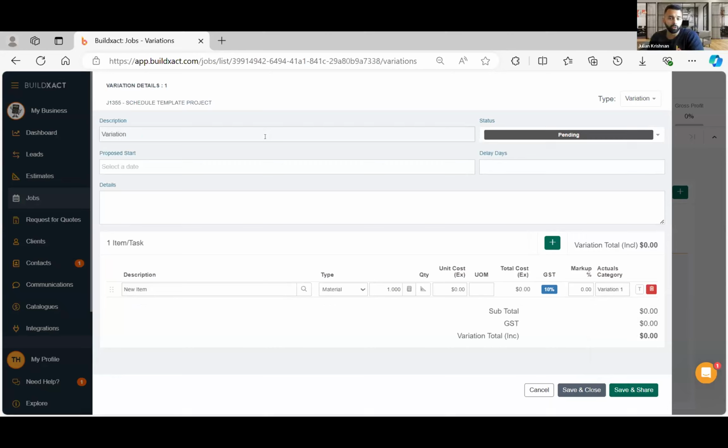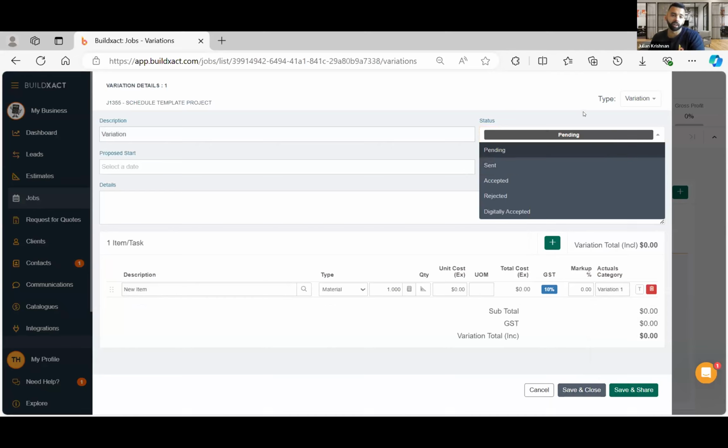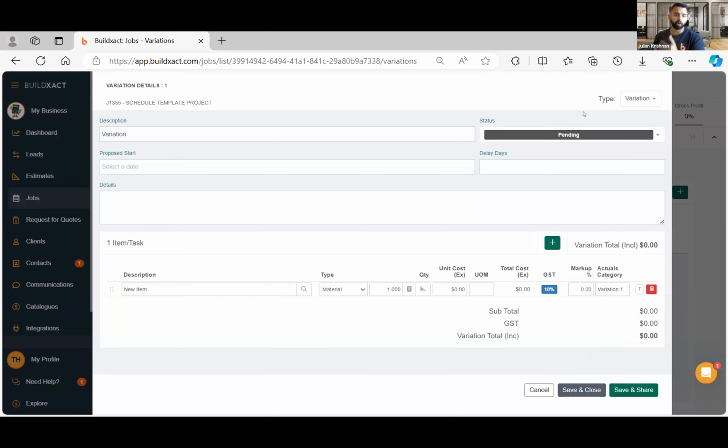And Tara, when you charge for the additional variation, is it like a one-off charge? Like, is it like $100 per variation, or is it like an extra 5% markup you add on? What kind of process do you use? Yeah, so as just a basic variation, it's $250 admin fee. That's where we can start off, but they can go up based on whatever you want to charge. And then for anything structural, we start at about $1,000.